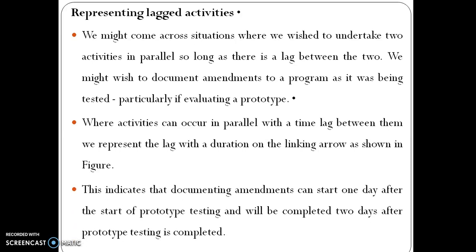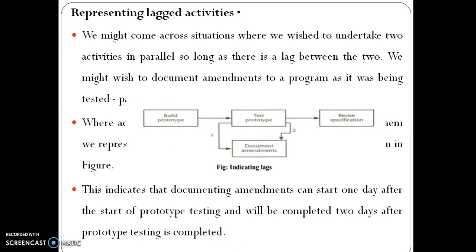This indicates that documenting amendments can start one day after the start of prototype testing and will be completed 2 days after prototype testing is completed. Indicating lags: build prototype, test prototype, revise specification, document amendments.